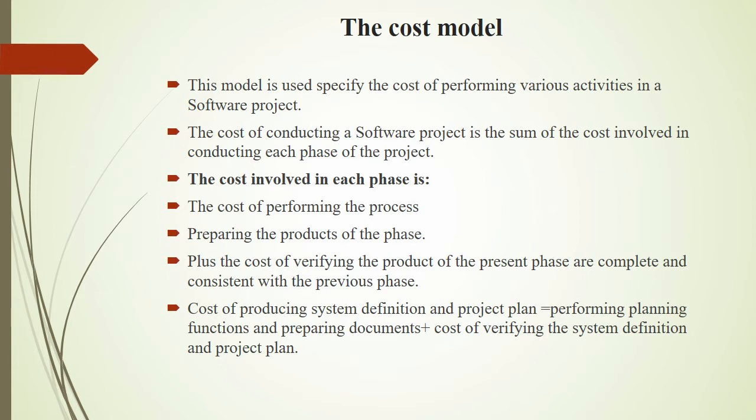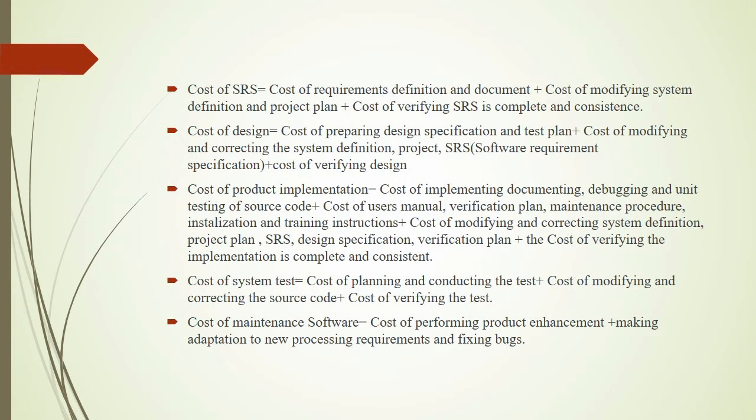Cost of producing system definition and project plan is equal to performing planning functions and preparing documents plus cost of verifying the system definition and project plan. The cost of SRS is equal to cost of requirement definition and document plus cost of modifying system definition and project plan plus cost of verifying SRS is complete and consistent.